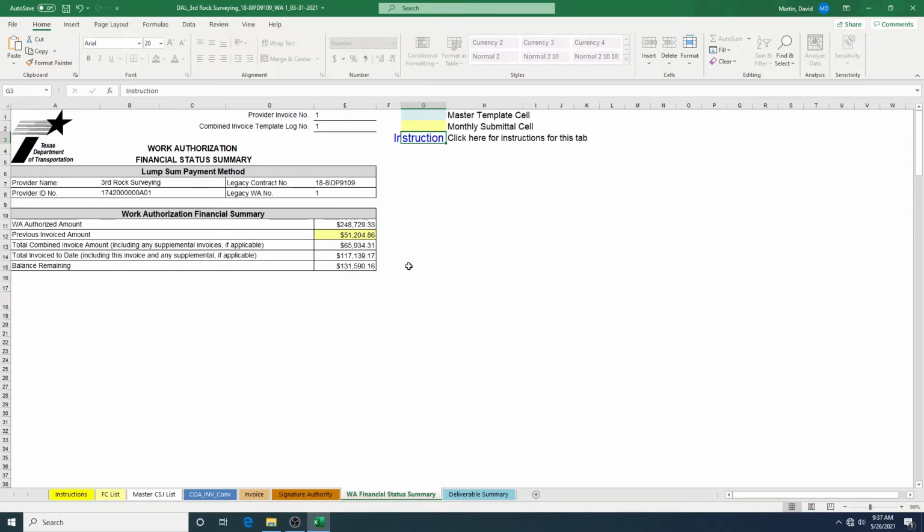A separate invoice package for the specified rate in the amount of $5,000 as shown on the Signature Authority tab will be attached to the lump sum invoice package. When using a supplemental invoice, in this example the supplemental template is to add a specified rate template. A master template must be set up and then the billing information must be added to the template per instructions.